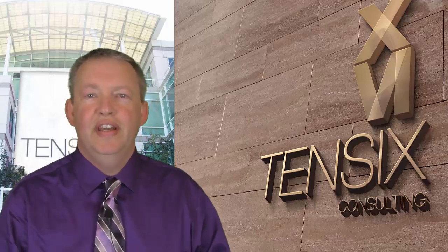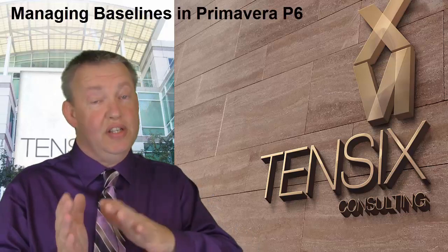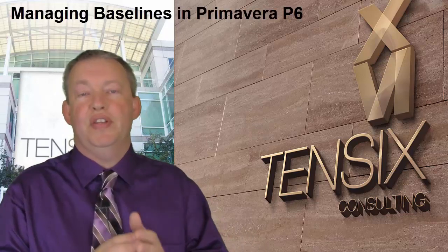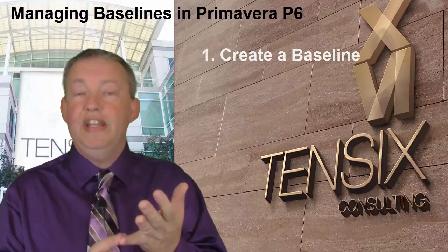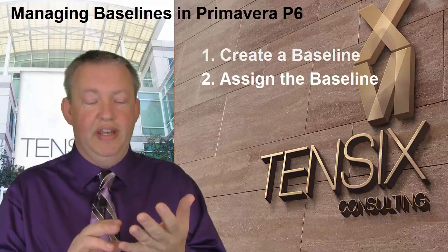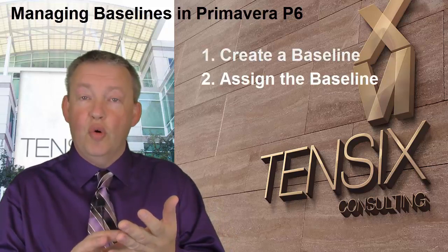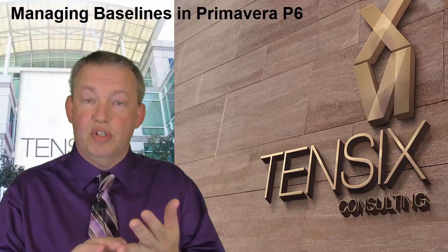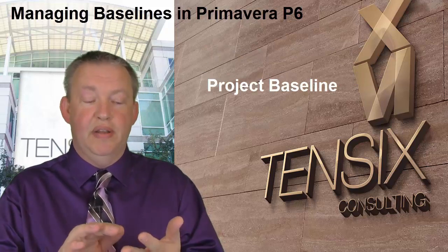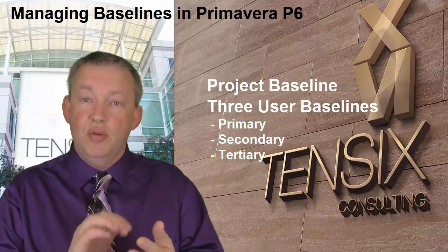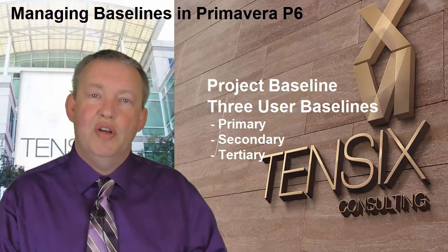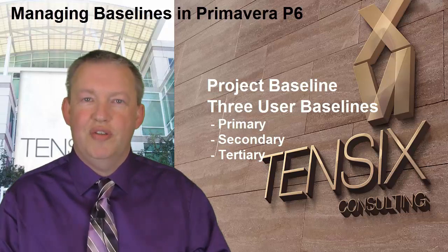Hi there, Neil Smith here with 106 Consulting. In this video I'm going to show you how to manage baselines in Primavera P6. Managing baselines is actually a two-step process: we have to create the baseline, and then we have to assign it to one of four baseline types — that's a project baseline and three user baselines. So let's see how that works in the software.